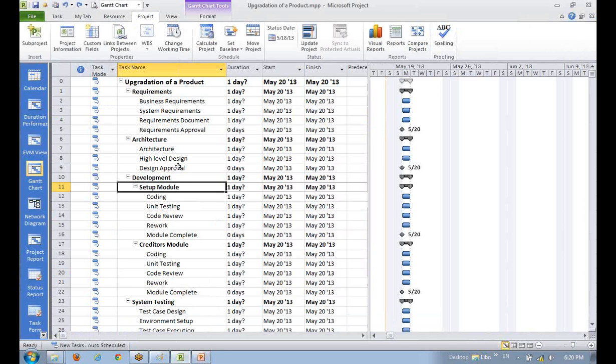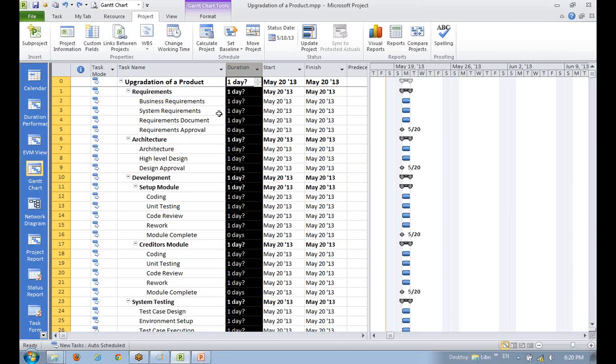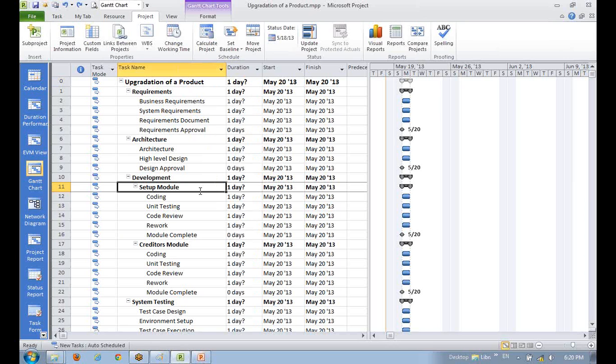In this case, if I am going to contract out all these activities to some contractor, I should estimate in duration; otherwise I should estimate in efforts. Now, because this is a software project, and the way it is planned, it looks like a vendor project plan, not a client project plan, right? So what should we do? We should estimate in efforts. Is this concept clear?